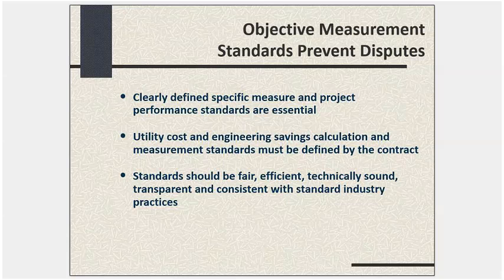If you ever have a dispute about measured savings and you go to an arbitrator, some alternative dispute resolution, or even a judge, and there's ambiguity in your contract and they can't find the decision rule clearly defined, they're going to figure out what the standard industry practice is and use that as their standard to determine who's right and who's wrong. So that's why that one's in there.